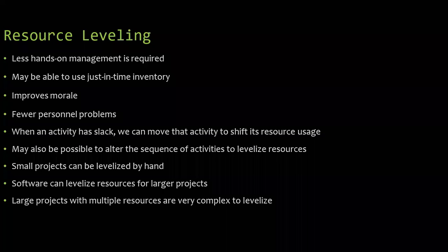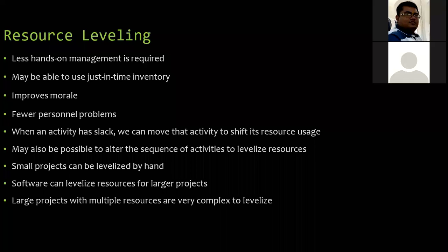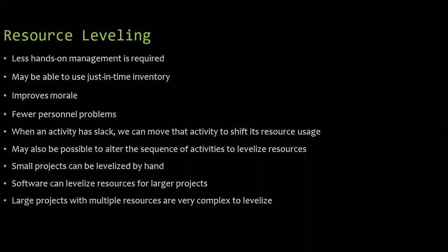The critical path is the largest duration path, and that gives the total project duration. That project duration of critical activities we cannot change.